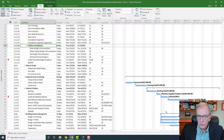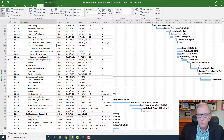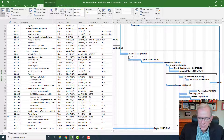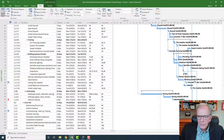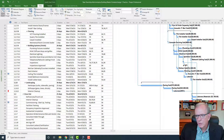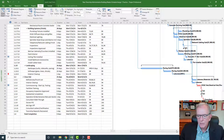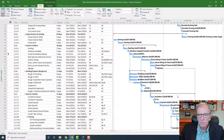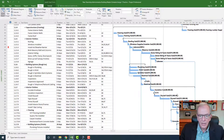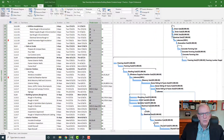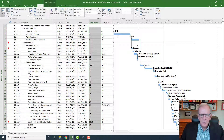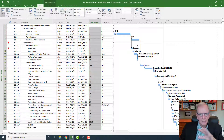One of the first things I talk about in my other videos is to make sure that everything is connected and that you don't have any open ends. An open end is where something is not connected. If you want to have a critical path, you need to make sure there are no open ends in your schedule. I can see a break here — this activity is starting on the project start date, which makes absolutely no sense.